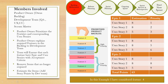The main objectives of backlog refinement are: the product owner prioritizes the features and corresponding user stories; the product owner explains required features from the backlog to the development team; the team ensures that each feature has epics and user stories with corresponding acceptance criteria; removes items no longer required from the backlog; and estimates items by adding story points, done by the development team.